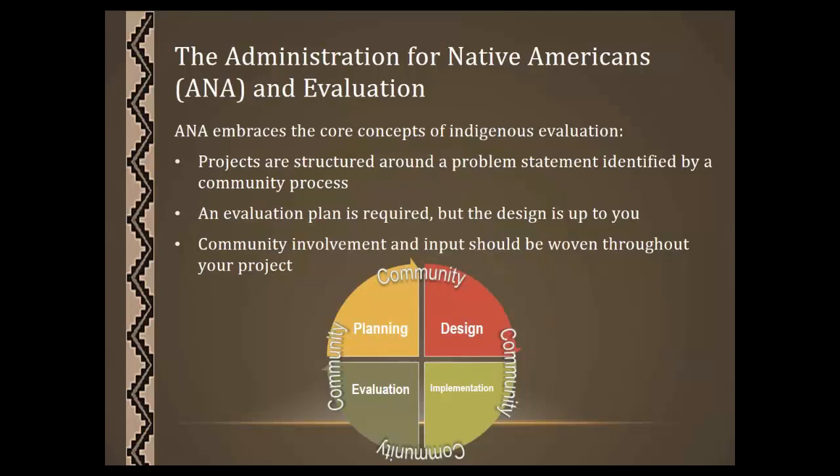And lastly, ANA asks you to include community involvement throughout your project. You don't just go and solicit input at the front end. You have community involvement woven throughout the implementation of your project. You provide the community updates on your project, and you also solicit input at the end of the project. The community is involved throughout your project.